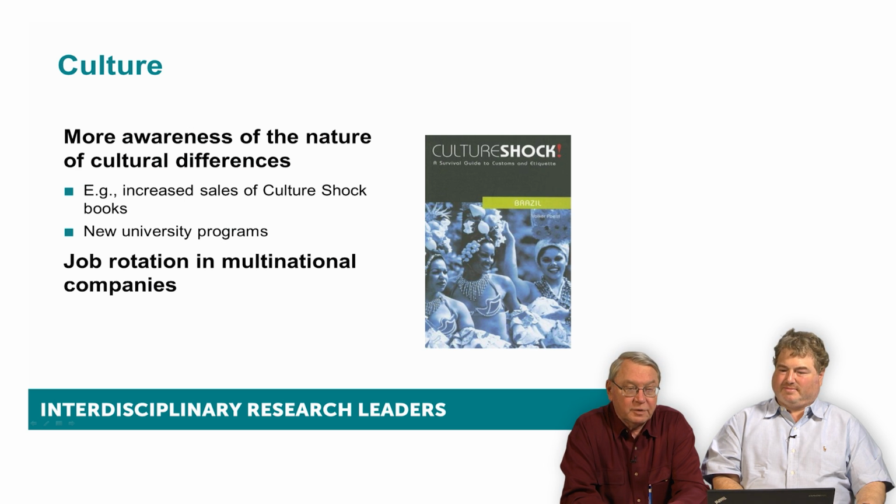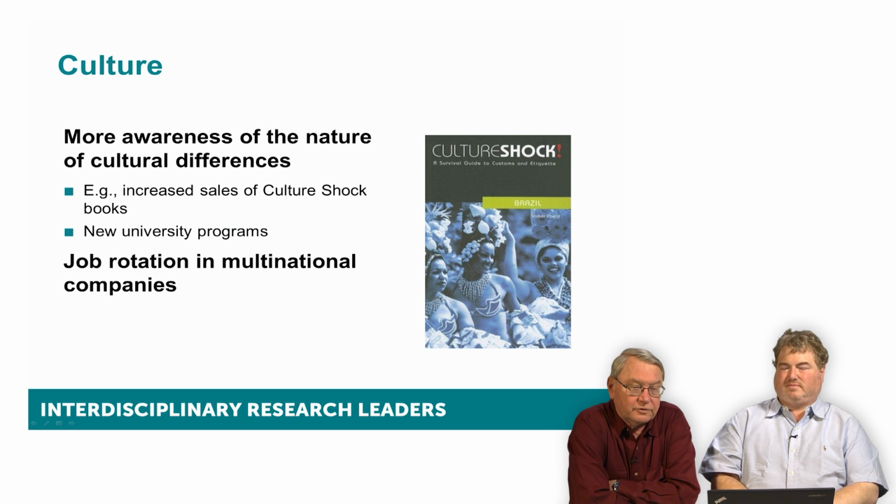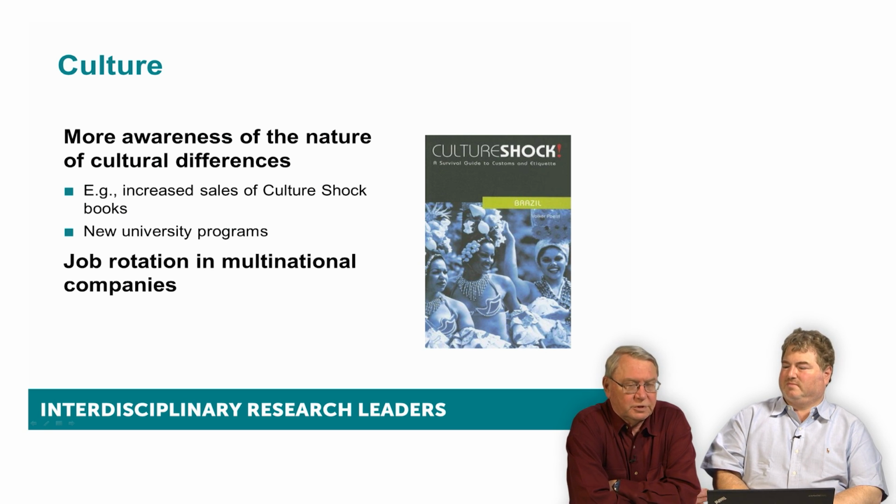One way that large companies have handled this is what they call job rotation. So we followed a project in Ford Motor Company that was between Germany, France, and the U.S. And what they made sure was that each site had at least one person from the other culture. And so if I worked in Dearborn, Michigan, I might spend 6 months in France or 6 months in Germany. And the idea is that those people can act as translators. So if something unusual and unexpected happens, I can say, oh, what you don't know is that, in the U.S., in such and such season, we do such and such.